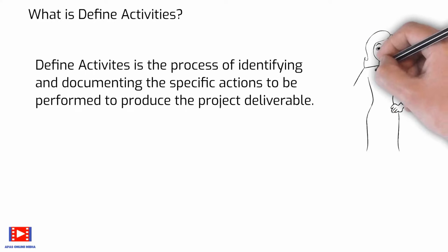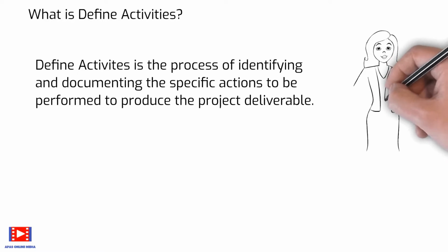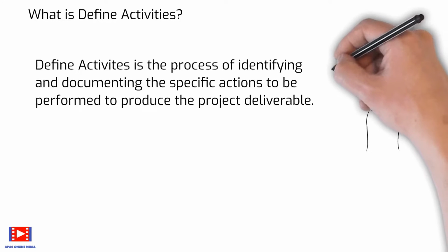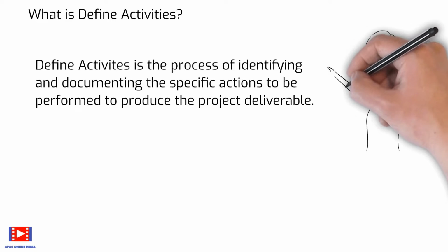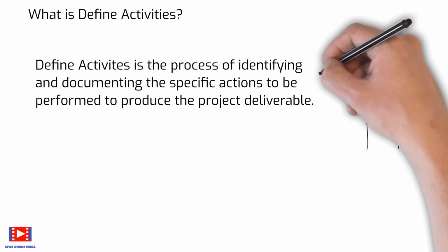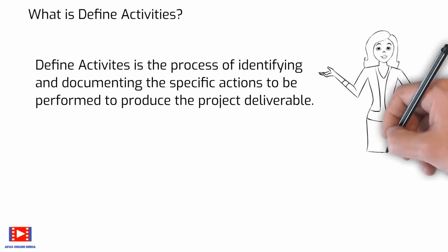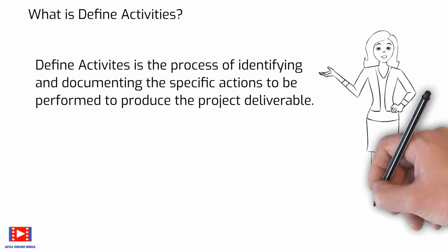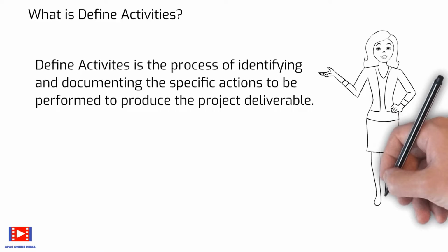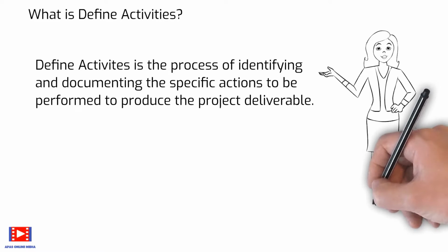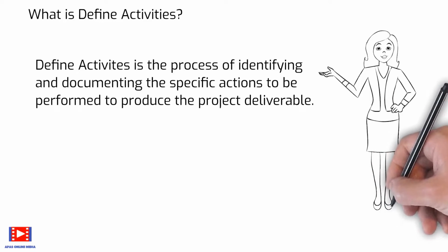The Create WBS process identifies the deliverables at the lowest level in the WBS, the work package. Work packages are typically decomposed into smaller components called activities that represent the work effort required to complete the work package.